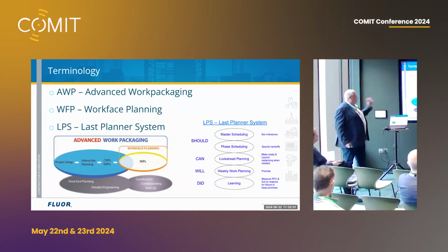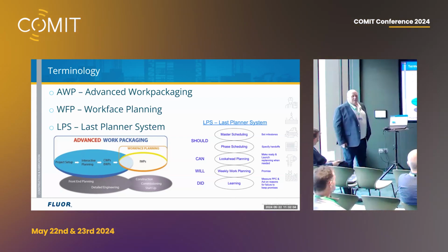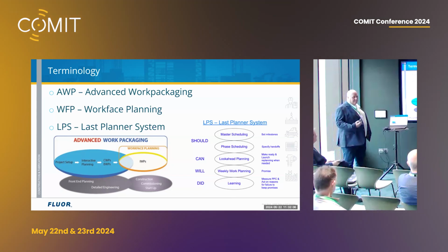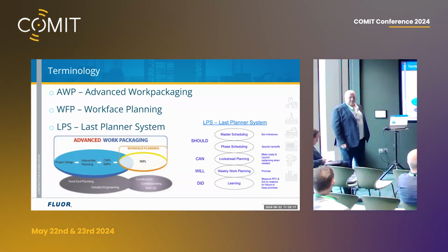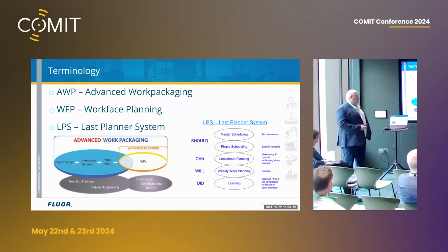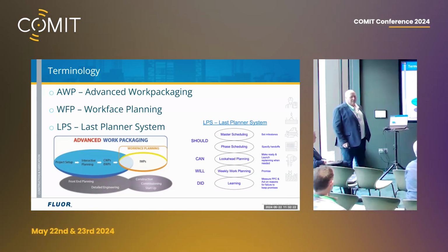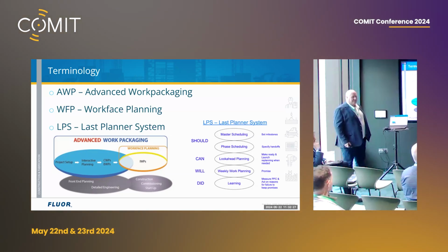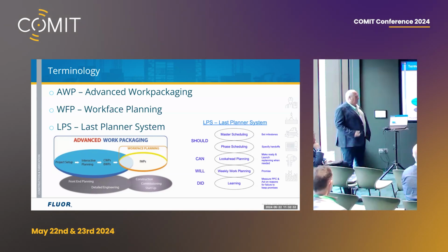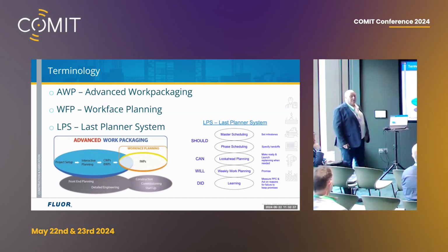So obviously, advanced work packaging is, from the start of the project, all about interactive planning, thinking about it in advance, breaking it down into work packages, whether they be CWPs, EWPs, PWPs, whatever acronyms you really want, and there's a lot out there. And that's all in the home office before it goes into the field. So as Jeff said, our crews want to get more productive, so we have to feed them the information. And that's where we get through workplace planning with IWPs. Also, if we've got the metadata up front, it goes into commissioning and startup a lot easier.